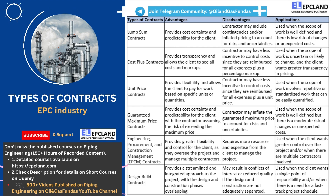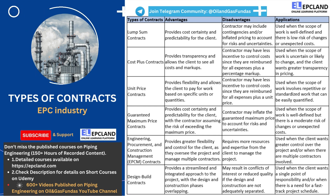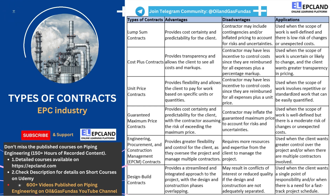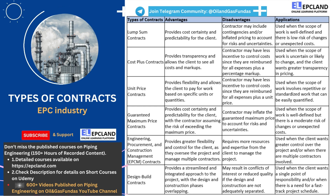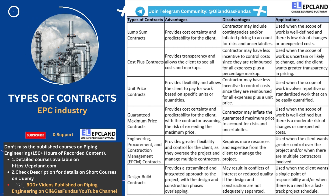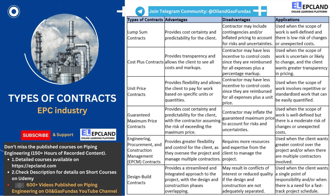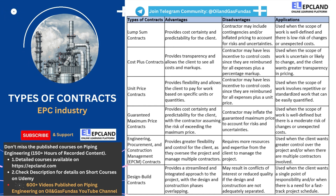However, there are also some potential disadvantages to GMP contracts. Because the contractor assumes the risk of exceeding the maximum price, they may inflate the guaranteed maximum price to account for risks and uncertainties. This can result in higher overall costs for the client. Overall, GMP contracts are best suited for projects with a well-defined scope of work but a moderate risk of changes or unexpected costs. They can provide cost certainty and predictability for the client, while also incentivizing the contractor to keep costs down. However, they may result in higher overall costs if the contractor inflates the guaranteed maximum price. As with any type of contract, it is important to carefully consider the specific terms and conditions of a GMP contract before entering into it.